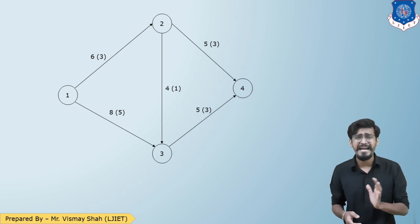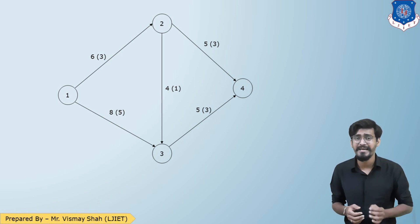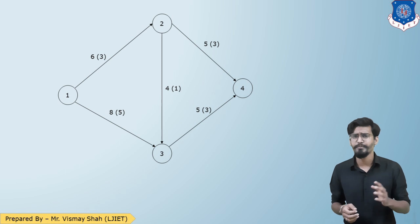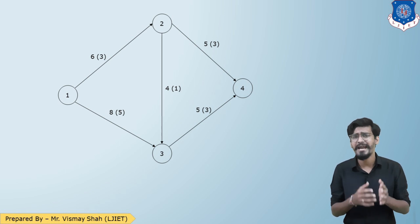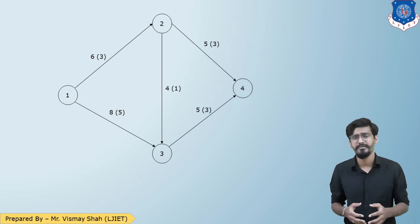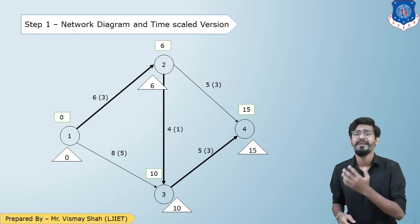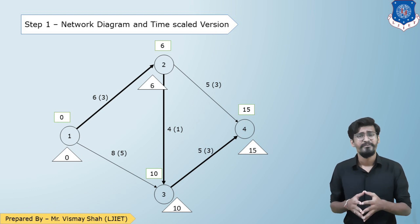The network is also provided. The very first step is to draw the network diagram with forward-backward analysis to determine the total project duration. I have done the forward-backward analysis, highlighted the critical path, and as you can see, the total duration for the network is 15 weeks.